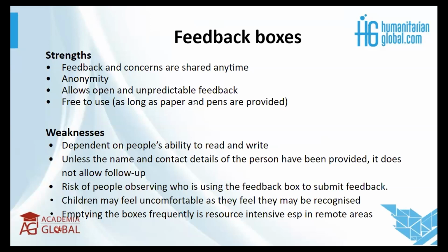You can use pens, which maybe you just tie somewhere where someone cannot take them. Or sometimes it's also important to just have the trust and leave the pen and paper there, and you can always observe and see if there's usage, if there's reduced usage, or if there's always people taking the paper but the correspondences are not matching. So maybe the papers have gone but there is no feedback. It could be either people are using it for different purposes, or maybe someone has stacked up their issues and doesn't feel safe enough to drop them in that particular feedback box. Maybe they are going to another facility or another area to put the papers that they've written down.